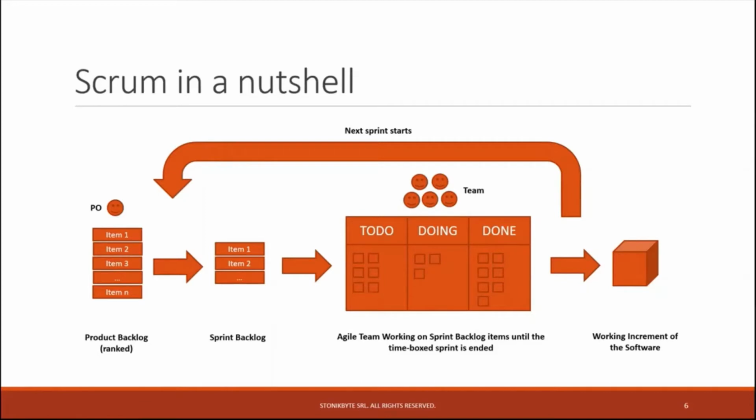Backlog consists of user stories that are end-to-end functionalities of the product to be developed, maybe technical tasks, so all the work that has to be performed in order to build the application. And this backlog is ranked. It has the most important items at the top of it, and every backlog item has an estimate. Estimation is usually done in story points, so it's a size estimate in story points. But some people prefer to estimate the work items in hours, for example.